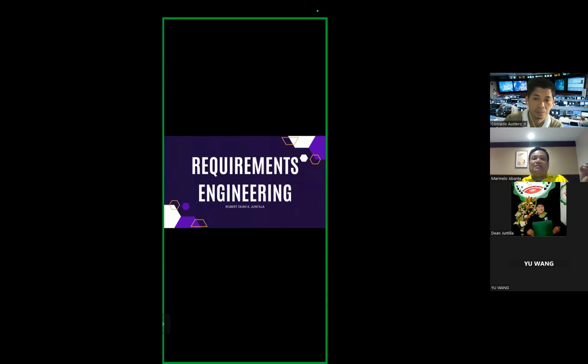In some cases, a requirement is simply a high-level abstract statement of a service that a system should provide or a constraint on a system. At the other extreme, it is a detailed formal definition of a system function. If a company wishes to let a contract for a large software development project, it must define its needs in a sufficiently abstract way that a solution is not predefined. So the requirement must be written so that several contractors can bid for the customers, offering perhaps different ways of meeting the client organization's needs.